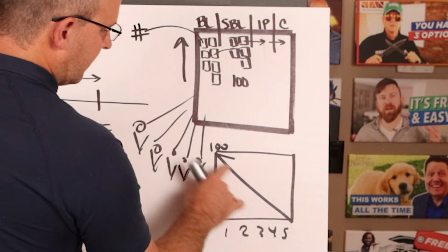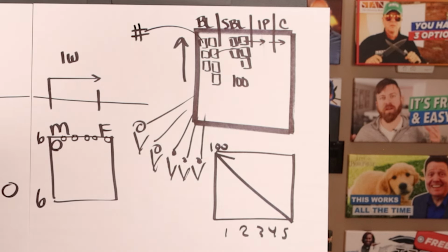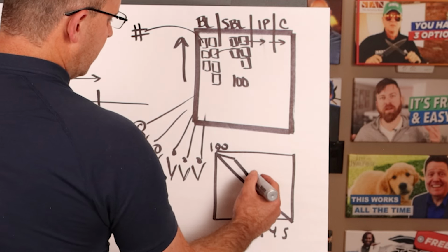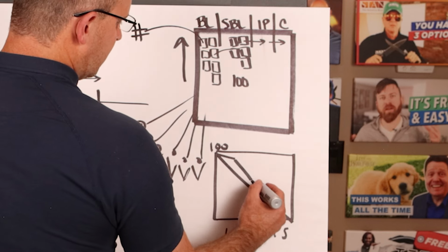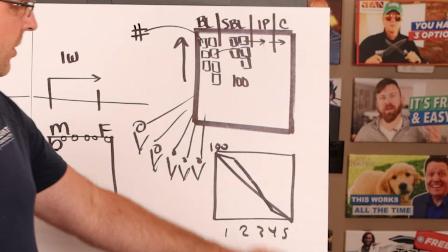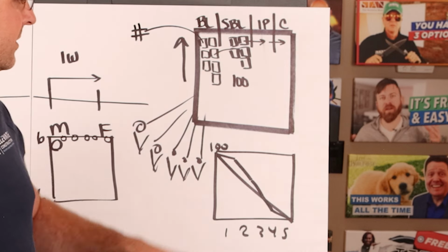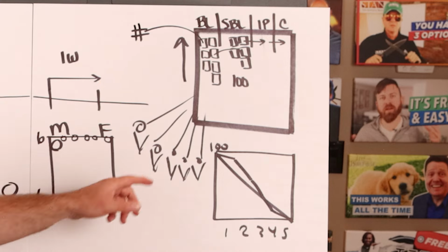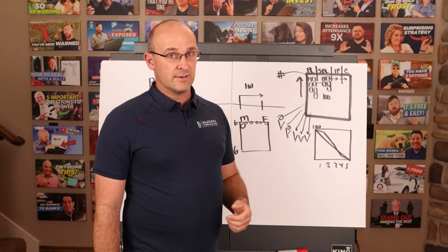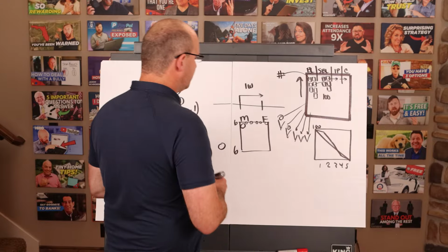That's not in line with that burn down chart, and they know that they have to recover. So maybe on Tuesday they do a little bit better. Okay, maybe Wednesday they do a little bit better, Thursday, and then we're back to normal. This burn down chart allows us to know if we're on schedule. So on a daily basis, if we're trending behind, we work on it as a team in a fun and collaborative way.